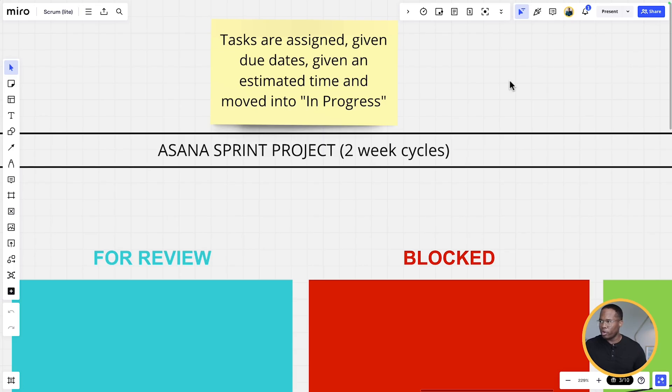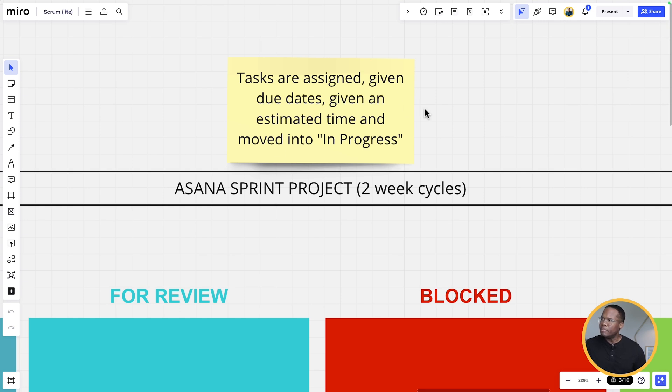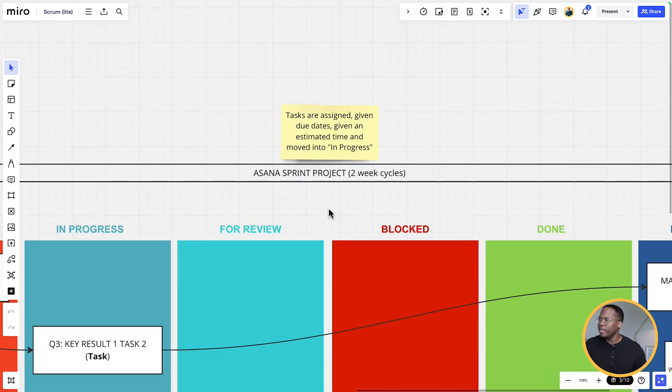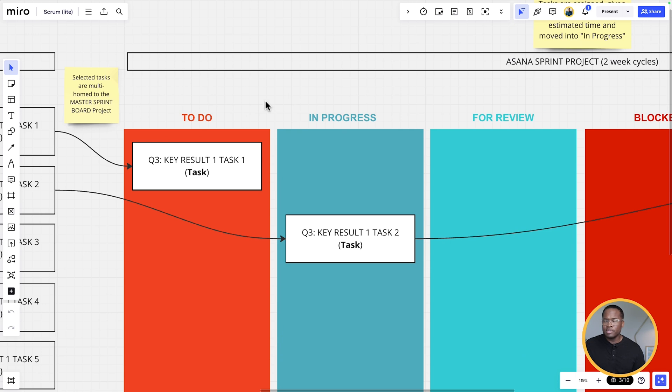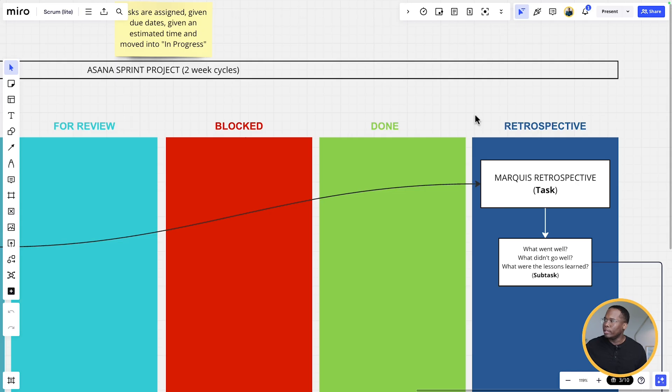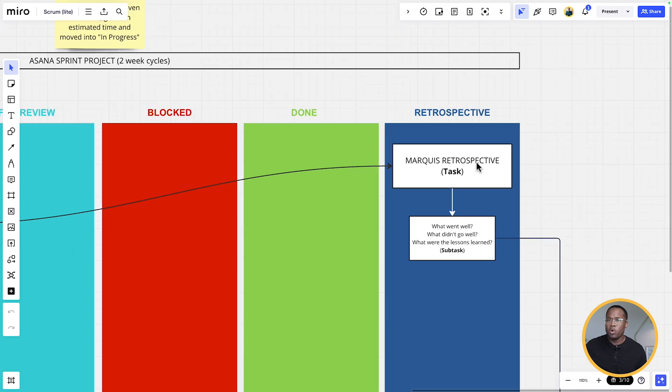We're giving ourselves two weeks because we're looking at achieving our goals and we don't want to rush things. We want things to be quality, and we have to consider that with our team we're delivering to customers. Our customers come first, so at least this two-week cycle gives us some flexibility. Within the master sprint board, tasks are assigned, given due dates, given estimated time, and then moved into in progress when they are ready. We move them through in progress, for review if needed, and if blocked, we have an automation in Asana — I'll show you that in a second.